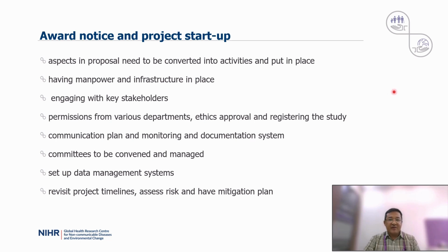show. For large-scale community studies, setting up a functional field office from where the project operations will take place till the study is completed. Identifying and engaging with key community stakeholders. The permissions need to be taken from various departments as per project requirements. Ethics approval and registering the study before participants are recruited.